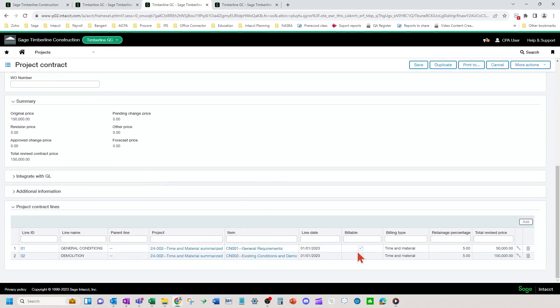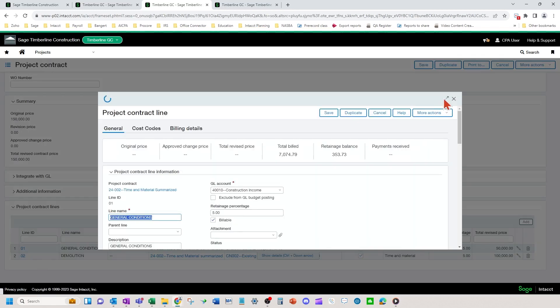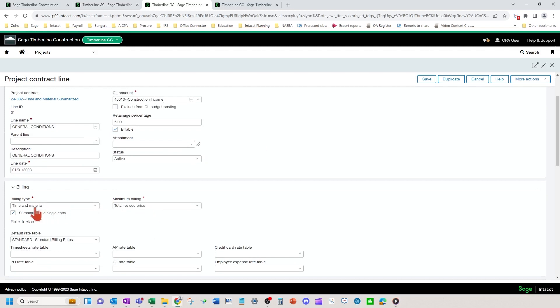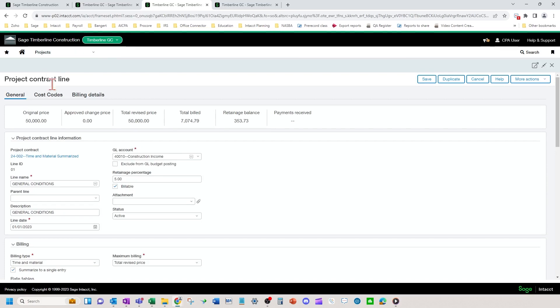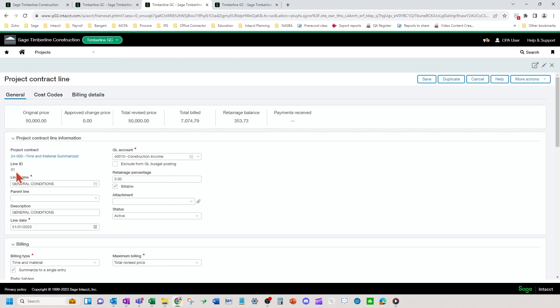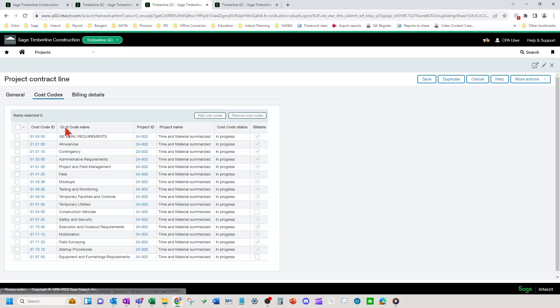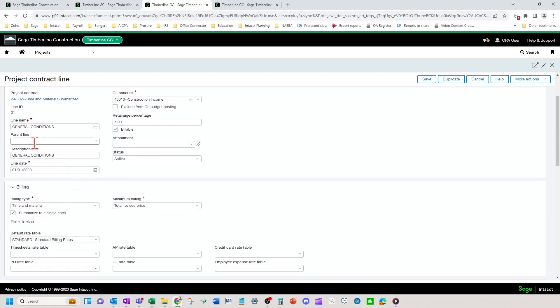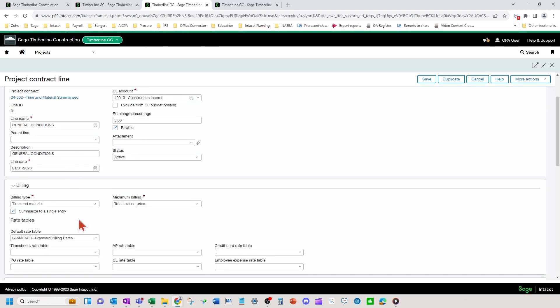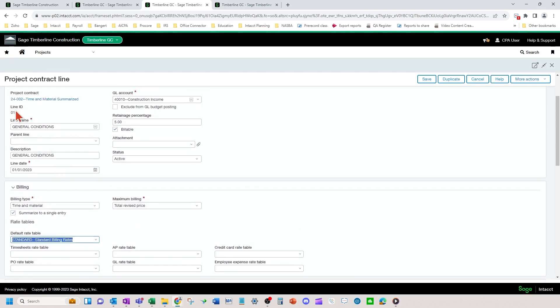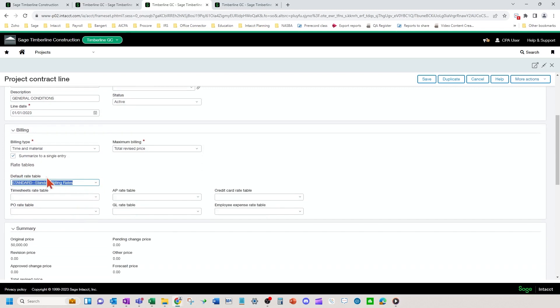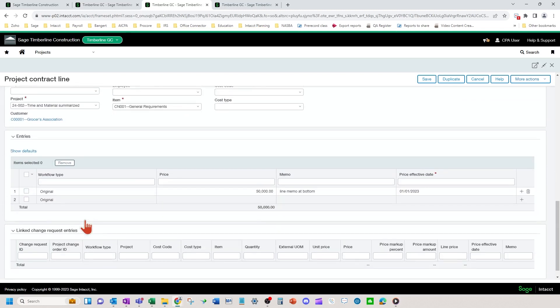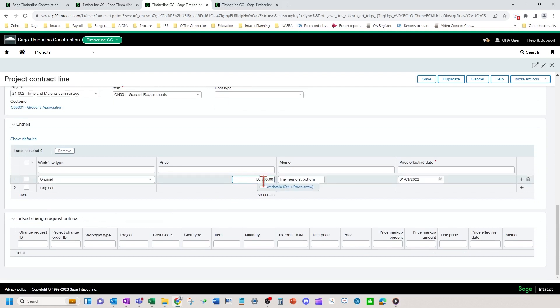We're going to set up our contract lines. We're going to look at one of these and I'll explain the difference here. So you're going to set up the top part here just like a time and material basis. You're going to set up time and material here like you normally would with the summarize checkbox on. What this does is it summarizes any costs that any of these cost codes that are linked to the O1 general conditions line. If you want the rate to flow through at the line level, the O1 general conditions line level, you're going to put the rate table on as well.